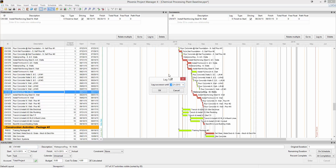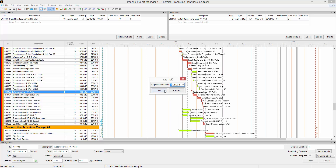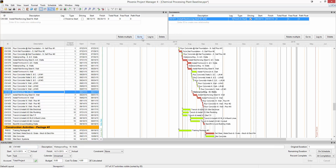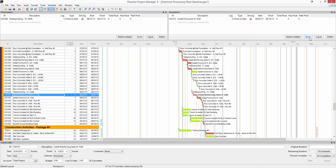The lag to feature will allow you to create a lag between activities. It will calculate the lag duration for you based on a date that you choose. Also in here, you can jump between activities by clicking on a relationship and then clicking the go to button, and it will go right to that activity.